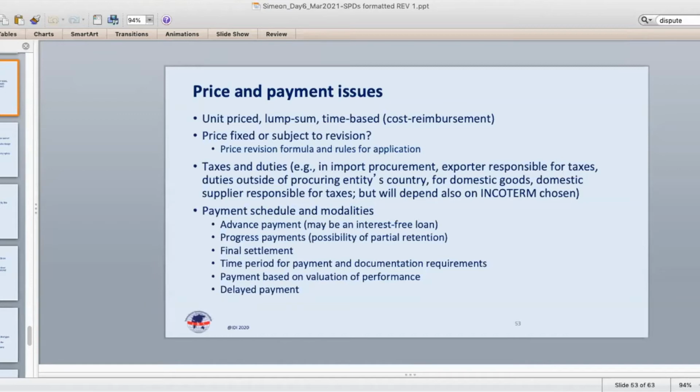And you realize that what really leads to these projects lagging behind is this 20-30% contribution from the borrower's side. In most cases, this contribution goes to compensation of the affected communities in terms of relocation, in terms of valuation of their properties, in terms of redesigning maybe the roads of the new projects, for instance, infrastructure projects.